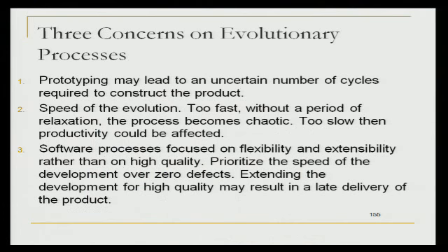When I do a release, we have two major releases every year, and then we have a number of intermediate releases. Each release is a significant amount of time just to manage the release. So the more of these iterations you throw into the process, the more of that overhead you're adding. So don't think it's free to add an increment or an iteration. There's always some overhead that comes with it. So you have to be careful of that.